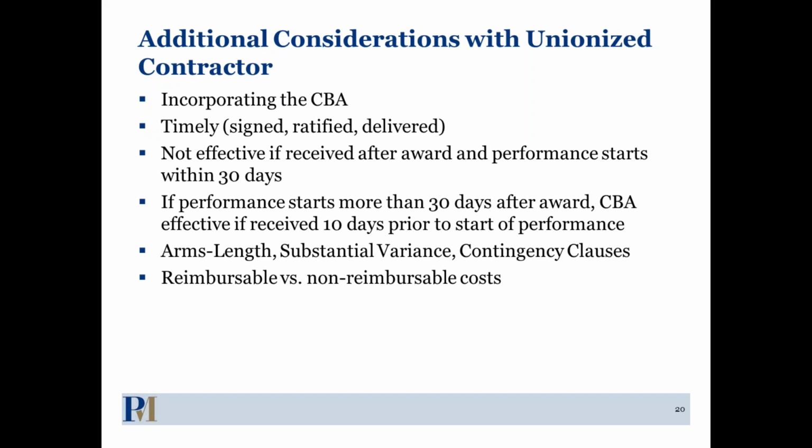But I would include it before invoicing for it. I would get a price adjustment request so that you can then invoice it. You could work this out with the contracting office, but generally the way we see it is that you would submit a price adjustment first and then go ahead and bill it.